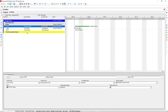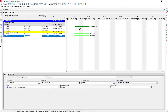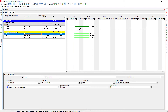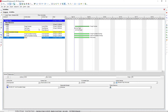Going to the Civil and Foundation Design WBS element, I'll select that and click the plus sign three times. The first activity is 'Design Foundation Drawings'. The next one is 'Approve Foundation Drawings', and then 'Release Foundation Drawings'. Notice these automatically default to task dependent, and that's how we're going to keep them.